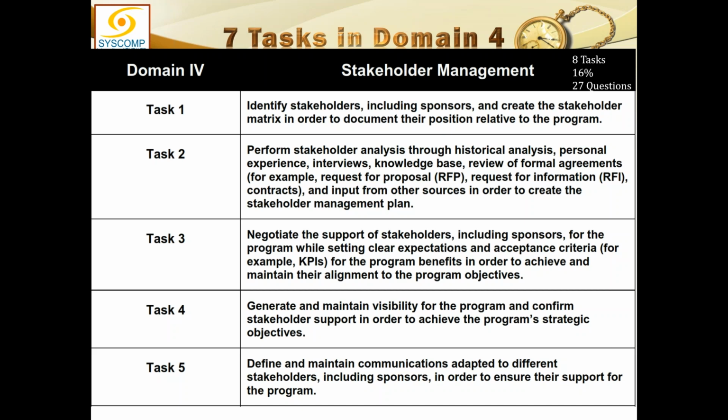When we do our stakeholder engagement register, we actually use both of them, and we even use the governance council matrix on it as well: how many votes do they have on vetoing it. So all of that is put in, and then you have a stakeholder register. All three of them go into our stakeholder register. Okay.